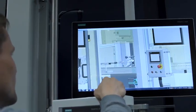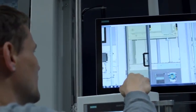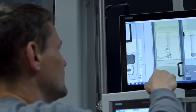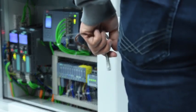Think about some of the things you can do virtually. You can reduce factory acceptance time through virtual commissioning. You can guarantee fast and accurate maintenance support. You can even start training operators before delivery.